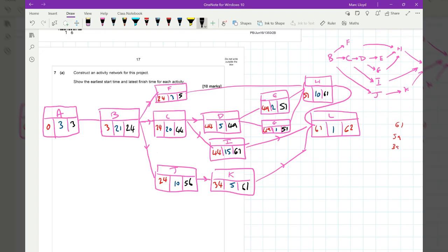And let's have a look at what else this question wants. It's normally an extra bit. Yeah, so list the critical path. So the critical path is where the first two numbers add up to the last one. And that's not what I wanted with the highlighter. Just crossed it out. So A is critical because if it takes longer than 3 minutes, the latest finish time is going to be a little bit later.